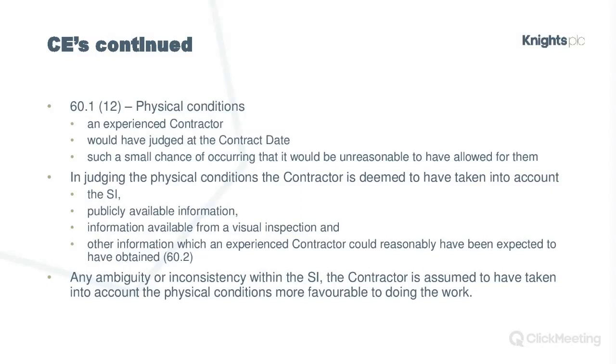in the following situation. So you've encountered physical conditions. It's not got to be weather, so bear that in mind, because there is another clause that gives you a separate provision for very awful weather, even awful by our standards.